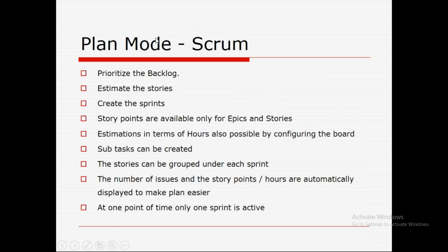Also, I spoke about the sprint ceremonies. So the first and foremost one is sprint planning. In the planning mode in the Scrum methodology, you prioritize the backlog items, give the priorities like P1, P2, P3, P4, etc. Estimate the stories, give the estimation for each and every item. Create the sprints or the sprint cycles.